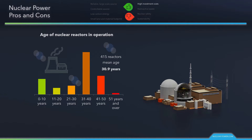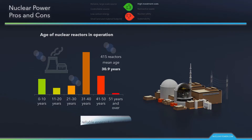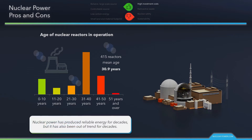Currently, there are no savings from mass production since the entire sector has been without major investments for decades. Opportunities exist to significantly reduce the capital cost and shorten the construction schedule for new nuclear power plants. Deploying multiple standardized units, especially at a single site, affords considerable learning from the construction of each unit. Simply, nuclear power has produced reliable energy for decades, but it has also been out of trend for decades. Nevertheless, it is a competitive low-carbon, large-scale source of energy.